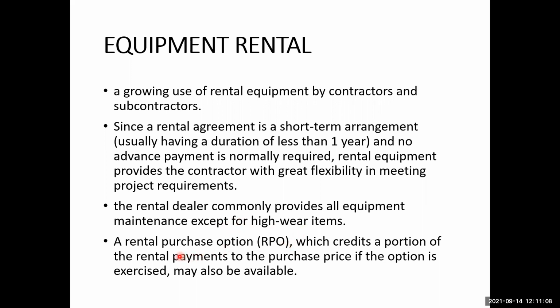Another option for renting the equipment is the rental purchase option, which means that you can rent the equipment for some period of time, and after that time you have the option to buy that equipment. So in that case, some portion of the rent you have paid can be offset against the purchase price of that equipment.